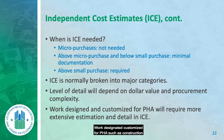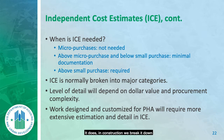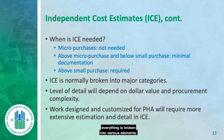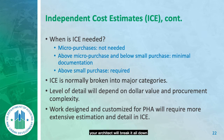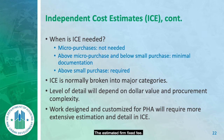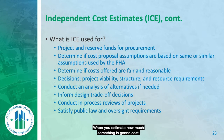Work customized for a PHA such as construction may require a more extensive estimation. In construction, we break it down using the schedule of values — the architect breaks everything into different levels of effort: plumbing, electrical, HVAC, and arrives at a total. I take that breakdown and put it behind the ICE, but on the ICE form itself I only list the estimated firm fixed fee.